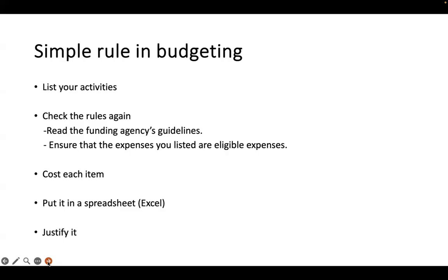Here I want to highlight a few things. First, regarding salaries, whether the funding organization provides salary for the investigators or not. Another aspect is the maximum limit for the overhead, that is, the indirect charge. The other one is the maximum limit for the contingency charge. You should go through these policies, and they should be addressed before making up the budget.